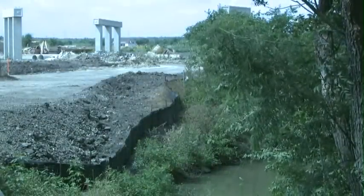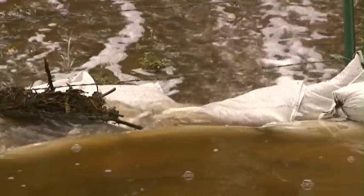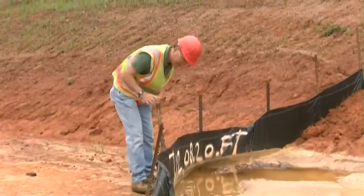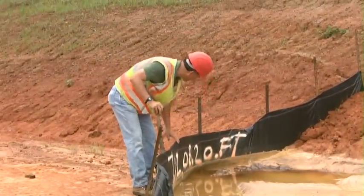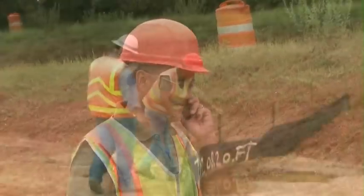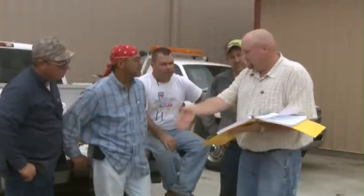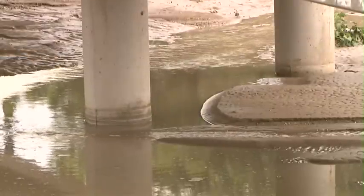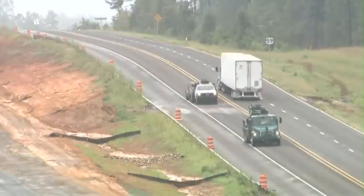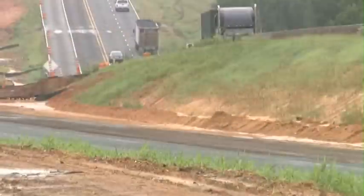If controls are not working, then they need to be repaired, replaced, or relocated. This is done through self-inspections. The plans will describe the means for communication between TxDOT inspectors and construction crews with instructions and schedules for inspections. Make sure that those instructions and schedules are discussed and understood. The SWP3 must be changed based on the results of the inspections to better control pollutants in runoff.